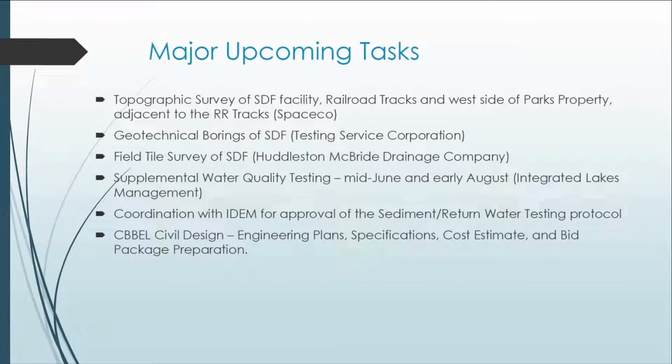So our major upcoming tasks: if the contract's approved, we're going to jump out there and immediately start doing our topographic survey of the SDF, the railroad tracks, and the west side of the parks property next to the railroad tracks, and that's going to be done by a sister company called Spaceco. Geotechnical borings of the sediment dewatering facility. We want to know what's underneath that facility.